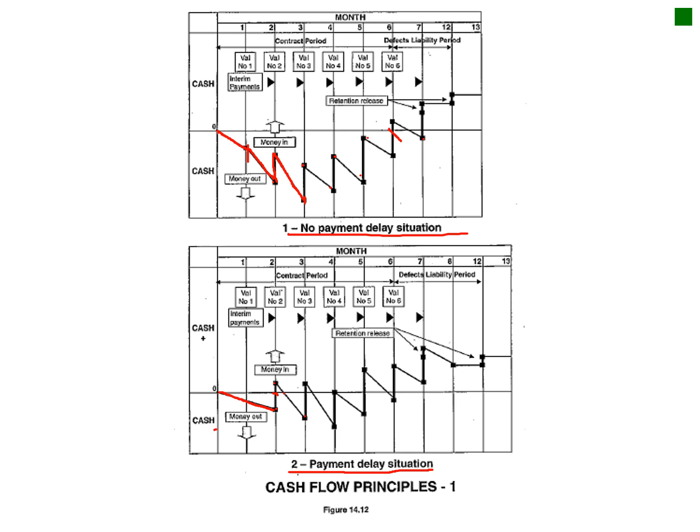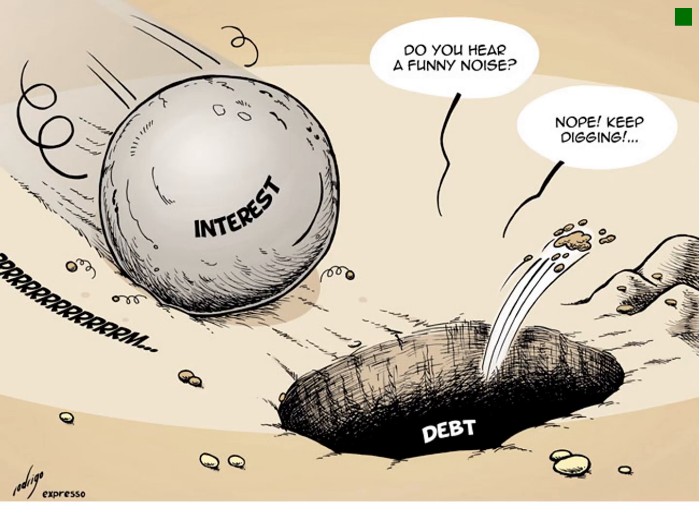So the amount of money that you have to borrow to finance this project is lessened, whereas you would have had to borrow that amount of money at one stage. Now you only have to have this amount as stated. The main thing about alleviating this is to prevent as much interest as possible, because interest eats into your actual profit.